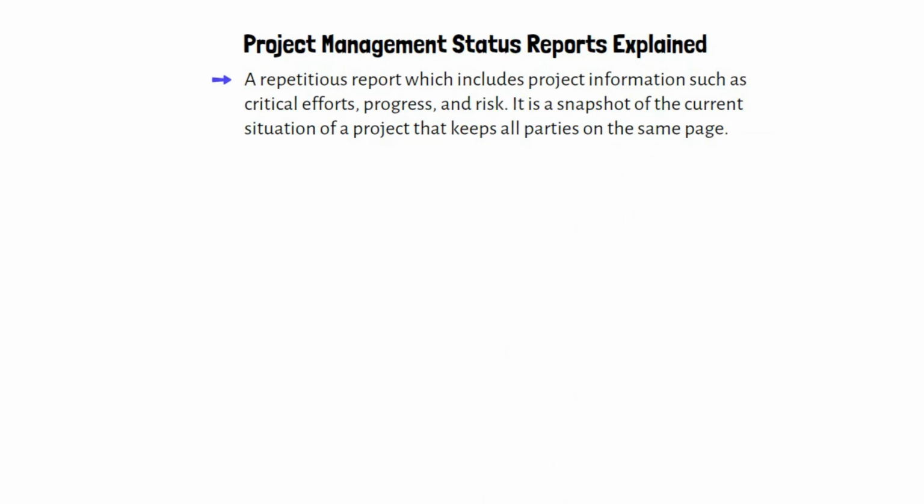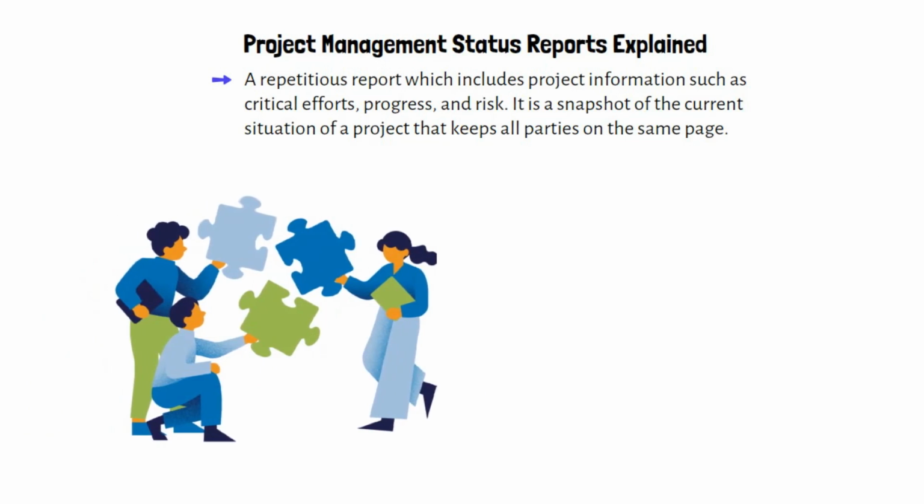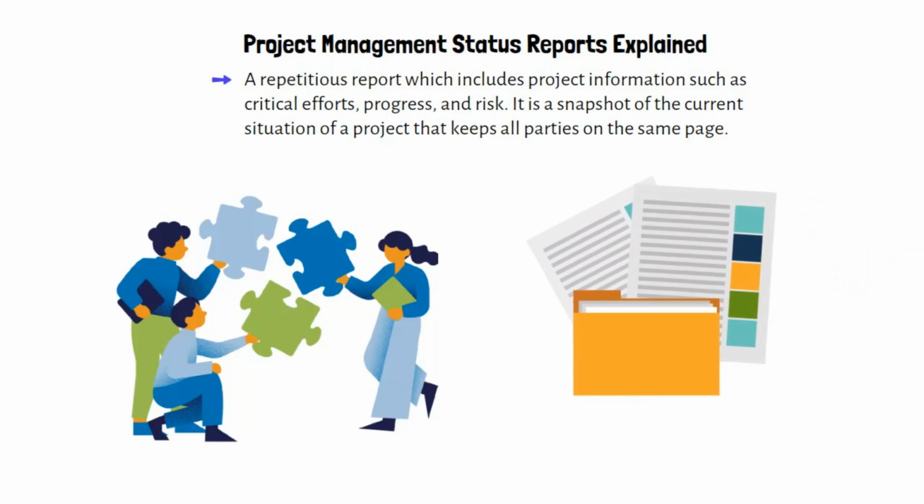From the project team's perspective, a well-created project status report always improves decision-making among the project team by uncovering issues. From the client's perspective, it provides information regarding the health of the project. Project teams prepare status reports after your project schedule is created and the project is in motion. Depending on the complexity and requirements, reports can be issued on a weekly or monthly basis.